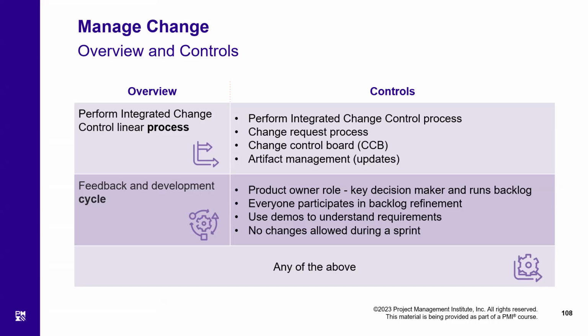Therefore, those have to be properly adjusted, prioritized, and rephrased, and the team is going to help with that. Once that is done, they can move on to their second iteration. After every iteration, they come to help the product owner in refining, grooming, and prioritizing the product backlog. This is going to happen after every iteration. This is how we manage change in Agile projects.